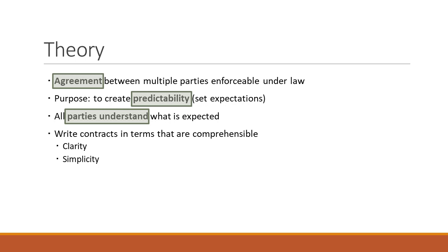One thing that may happen to you guys in the construction world is your company as a design firm, let's say you're working solely for a design firm, may see some business opportunities with a contractor, and for a project you may enter into a joint venture agreement between architect and contractor. You become an entity that then enters into the agreement with the owner to do design-build. So you're going to have three parties: the owner, the contractor, and the designer in the design-build, with an agreement to perform services. The terms and conditions of that contract are what's enforceable under law.